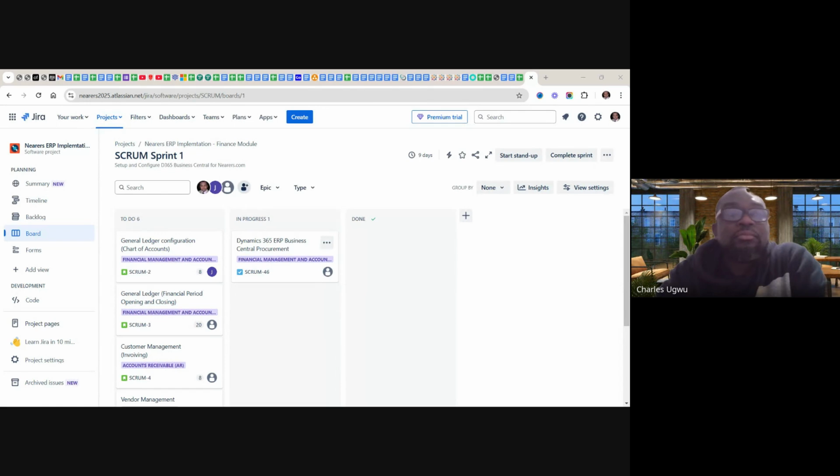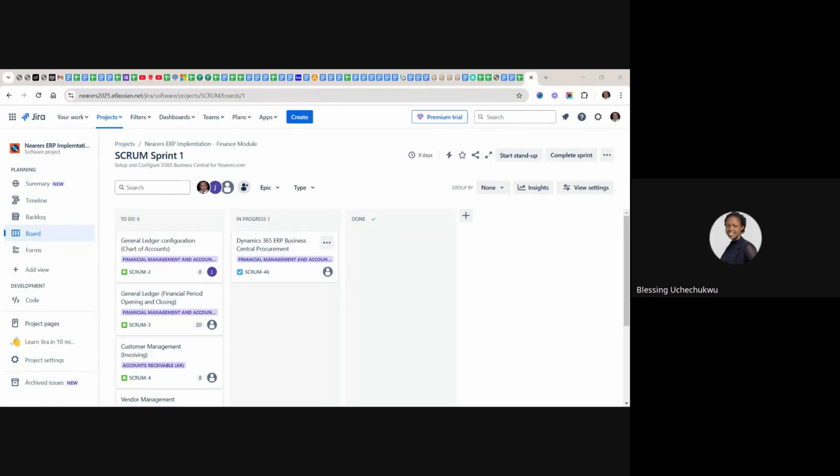You don't add points for them. They decide what to work on. You don't have the power to, according to the Scrum Guide. I'm quoting the Scrum Guide. You don't assign them work. They decide what to do. That's why they are a self-organizing team. You can't say you must do 200 story points. You don't have the right to do that. If you are doing that, it is no longer Scrum. You are doing another thing.